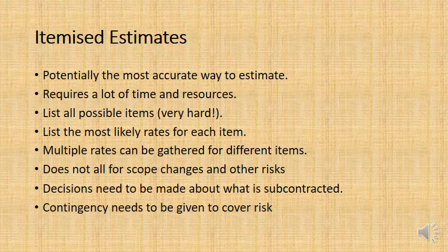The other issue, though, is you do need a fairly accurate scope in order to itemize all of the different items in the estimate. And if the scope changes, then the estimate needs to be updated. But if you've laid it out correctly, you can update it without too much effort.